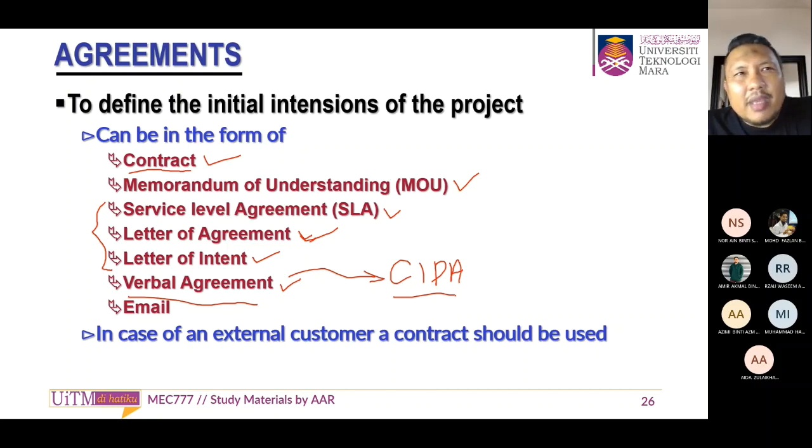And then Fadlan came and did the job, completed everything, and then Fadlan wants to claim. So I said no, we don't have anything in black and white. A call or a discussion in the coffee shop is also considered an agreement. But it's very difficult to prove. Very difficult to prove. But if we see the project running, then actually we can claim.